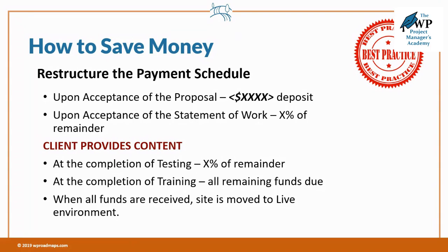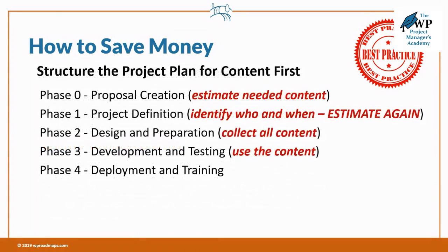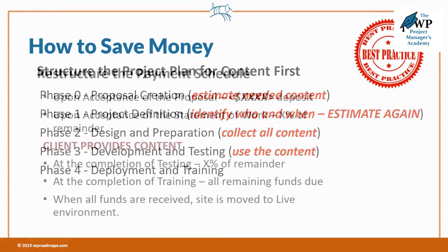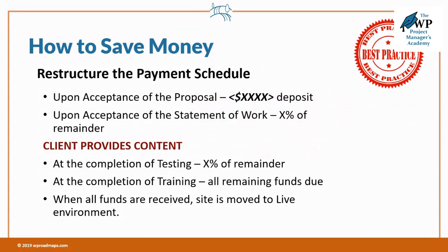You wait until you've got the project approved, you're starting on the project, and the first phase 1, let me back up. Phase 1 is project definition phase, where you do that deep dive. And at the end of the deep dive, if we found so many changes and so many new things that weren't discovered in that initial meeting with the client, and we discover those things, that ends up making it exceed the range I gave them in the proposal, I give the client the option to cancel.